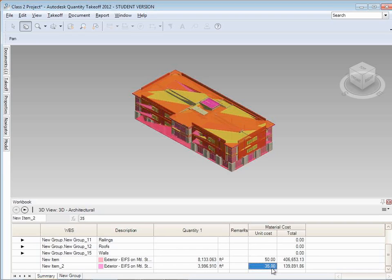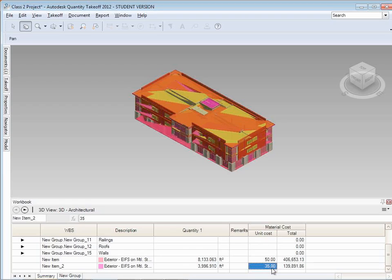Now, in working in quantity takeoff, what it's really good at is just pulling the quantities out. That's what it really excels at. And for each of the different types of things, you get to decide, is that something that's based on square footage, is it based on volume, is it based on linear foot? For example, if I was doing railings and things like that, that's a good linear foot thing. Okay, so it's $100 per linear foot of rail. If I was doing doors and windows, I'd say, I don't really care about the square footage of doors. I'd say, that's a $500 door, and there's 100 of them on this floor, so I just multiply that together. That's an each item. So for every different item, you could just sort of say how it's quantified, put the cost in here, and it'll summarize that stuff.